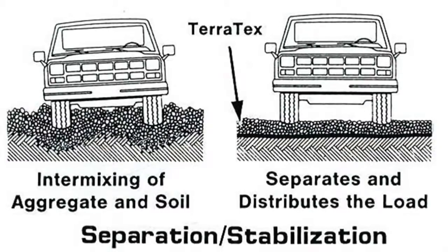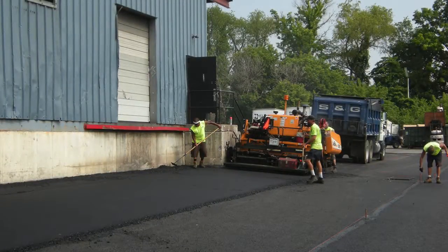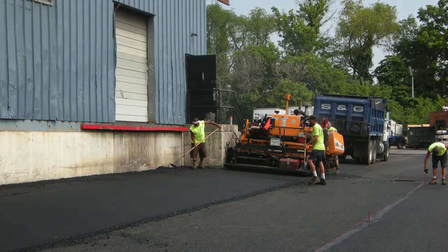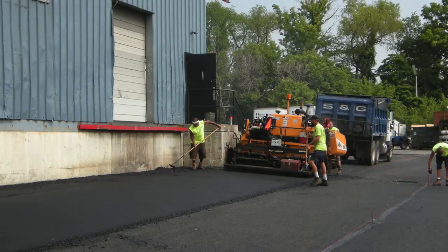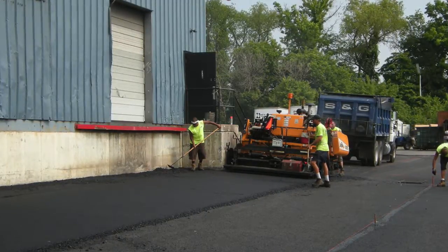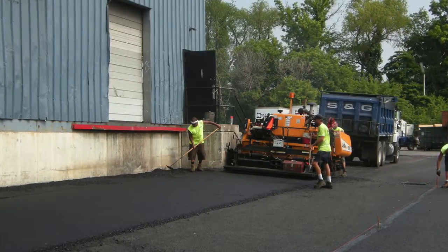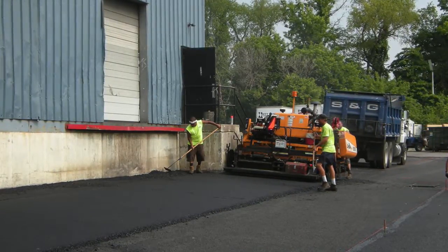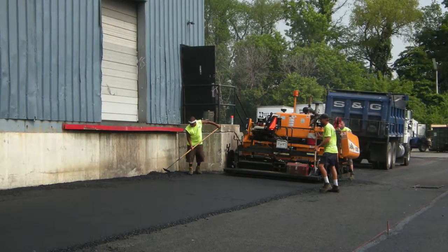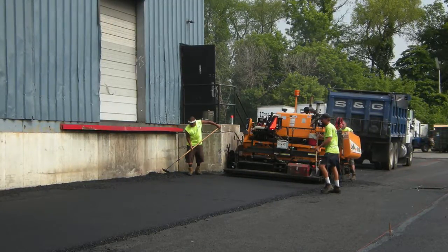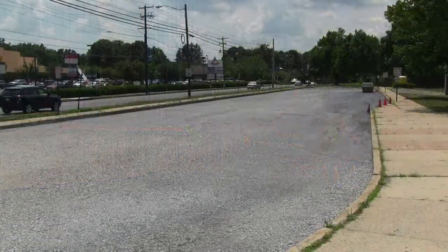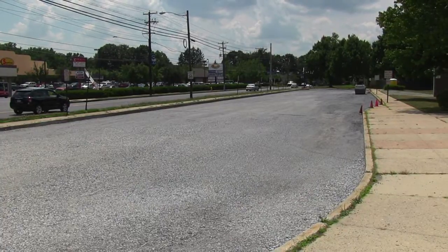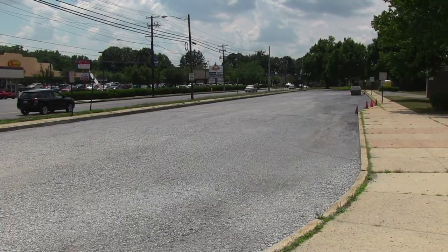When preparing the stone base to accept your new asphalt installation, we want to ensure that the stone grade is at an elevation and grade that will allow new pavement to drain properly. We achieve this by setting grade stakes that are set by laser transit or builder's level. Our crew members use a string line from each grade stake so that we can ensure the optimal amount of drainage possible. Once the stone grade is achieved, the stone will be compressed by a vibratory roller. Once the preparation is complete, we will then install your paving.